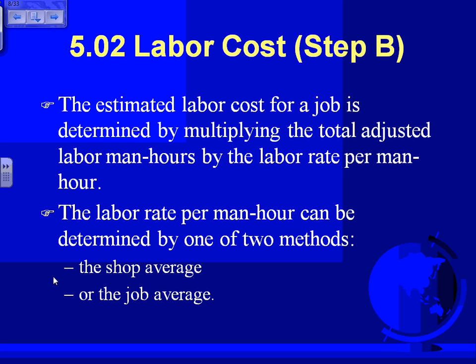I have a foreman, I'm paying him $14 an hour. I don't know where you find a foreman for that. Foreman, $14 an hour. Journeyman, 12.25, and apprentice, 9. Now, all you have to do, Phil, my friend, is add the numbers that we have here in our area and do the same thing. Then I have 1 foreman, 1 journeyman, and 3 apprentices for a total of 5. Then you add how much money each one of them is paid, add them up, and divide by their number. And that's where they come up with 10.6.